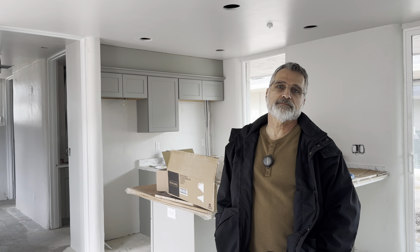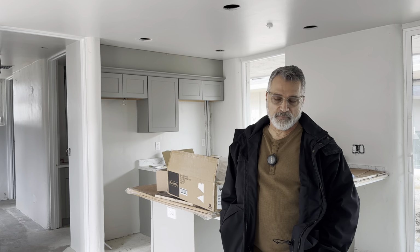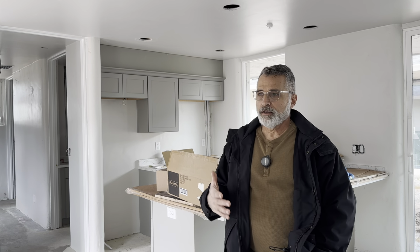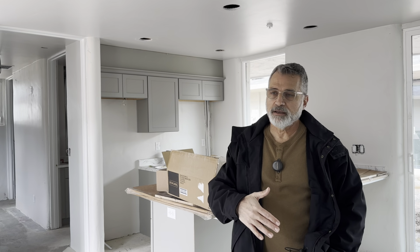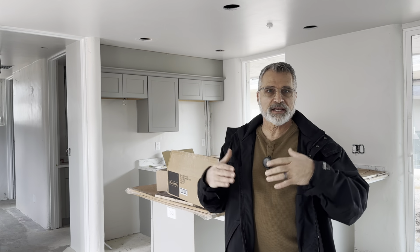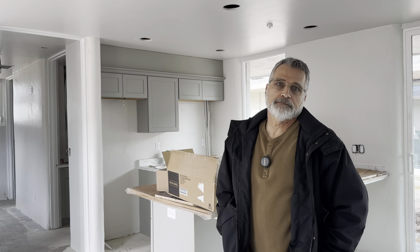I really like the round structures because you can really make the argument at that point that it would be much more challenging to do with traditional construction. That's right. Everybody wants to make the comparison of cost per square foot, conventional to 3D printed, and it's not fair. It's a little bit of apples and oranges, because if you want a square rectangle structure, I'd say that stick framing will beat the 3D print any day of the week. But if you want curvy and organic, and even functionally curvy, not just for beauty's sake, curved buildings and walls, I'll put that up against stick frame any day, and we should be able to beat it in pricing.